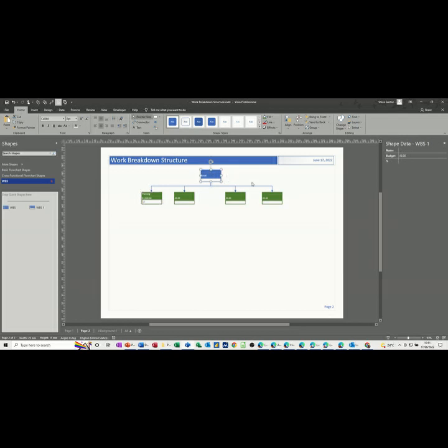I think I did the other one, and it's 2% of the overall project. Now I haven't put the title on the top one, what's going to be build a house and a budget of 200,000, and that would be 100% of the cost. There's different ways of doing these work breakdown structures. It's up to you how you do it. This is the way I'm doing this one.